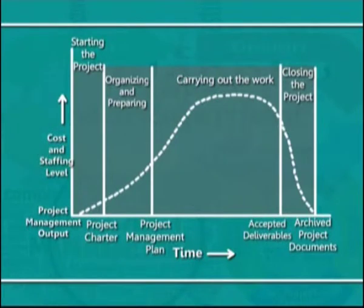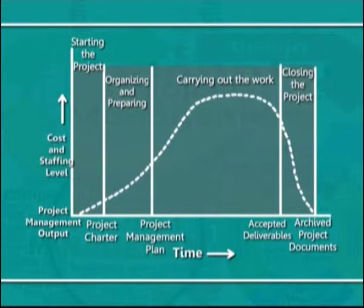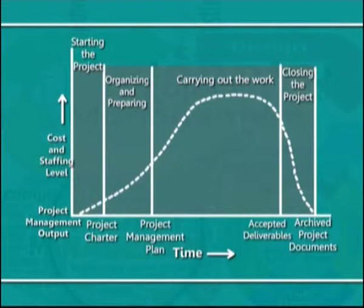Let us try to understand the different project life cycle phases. Most projects include at least four project life cycle phases: beginning of the project, planning and organizing the work of the project, performing the work of the project, and closing out the project. In the project development phase, there will always be a gradual build-up of resources. This will be followed by a long duration plateau where most of the expenditure would be incurred in terms of planning, organizing and performing tasks. Towards the end of the phase, there will be a rapid run-down as the project draws to the closure state.